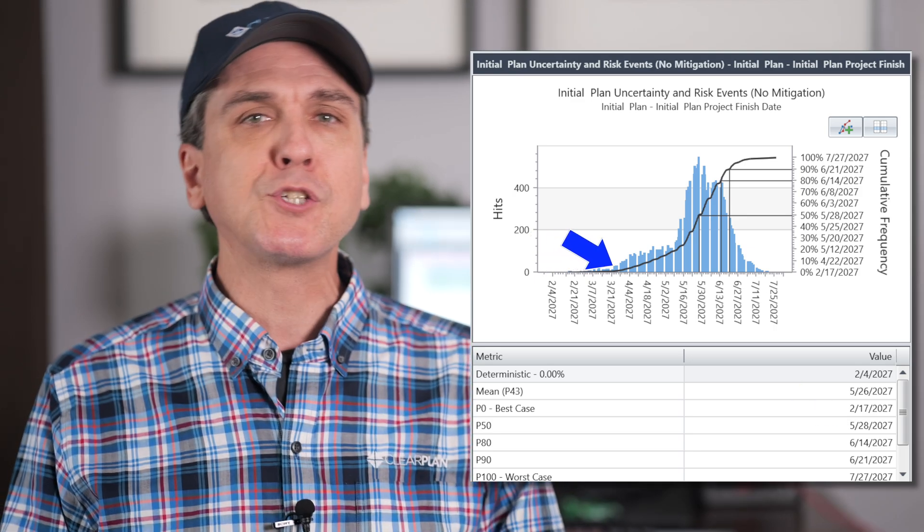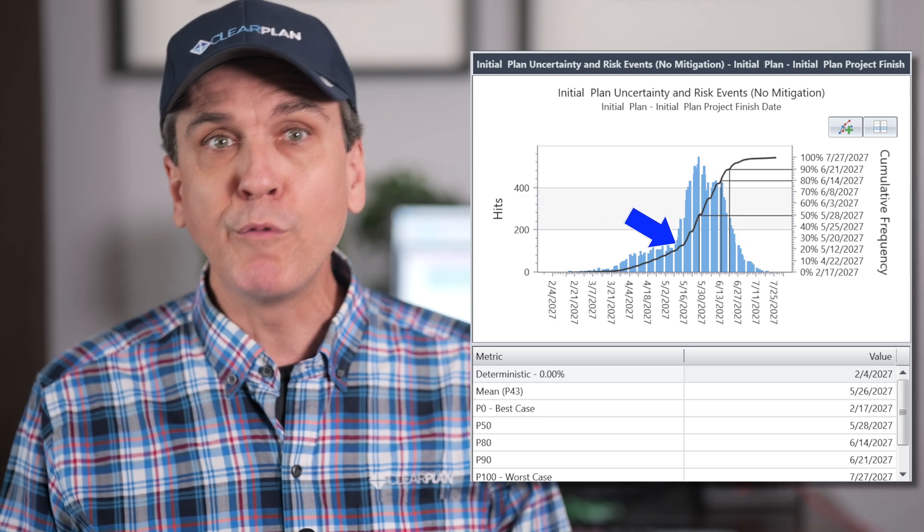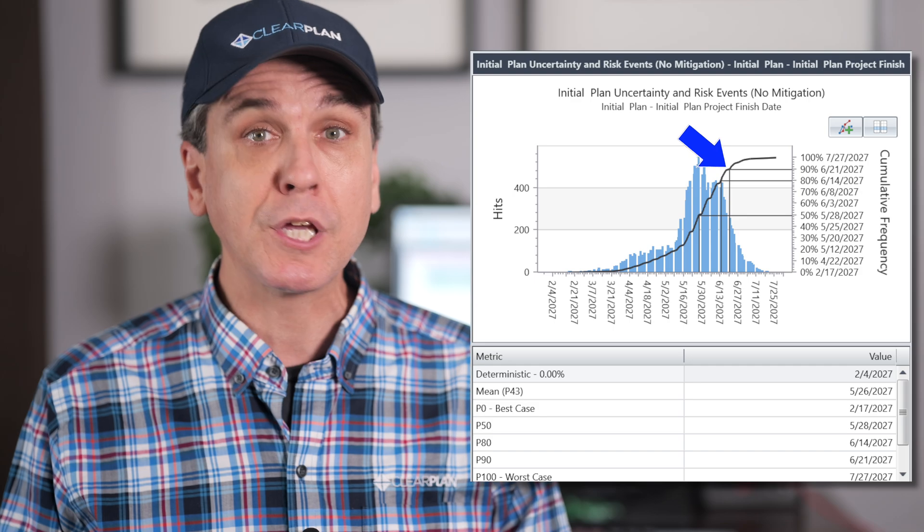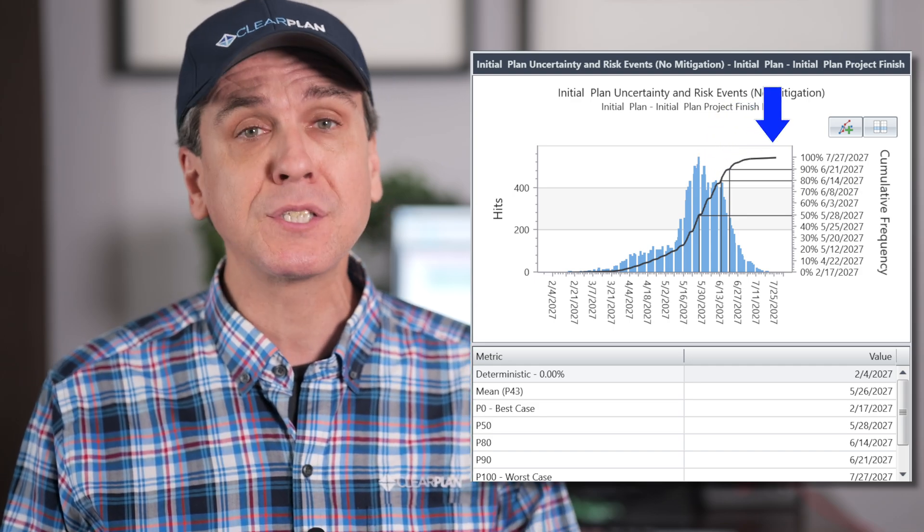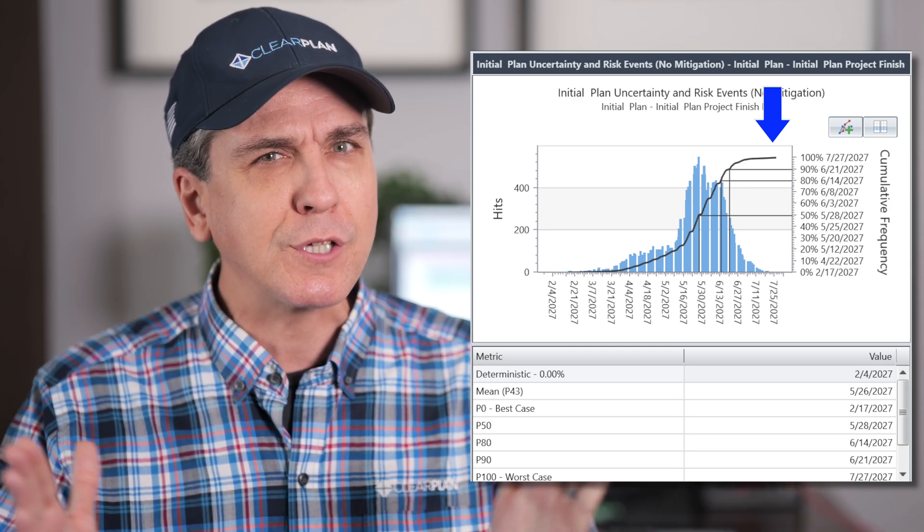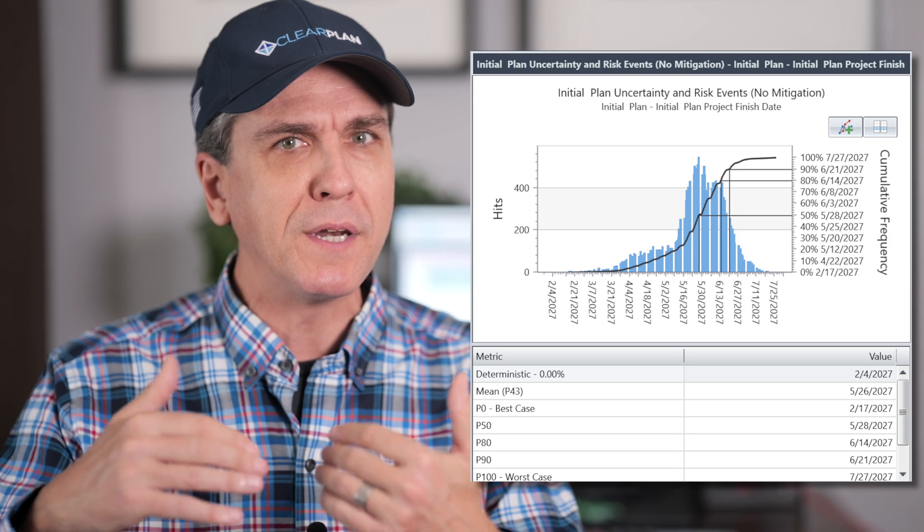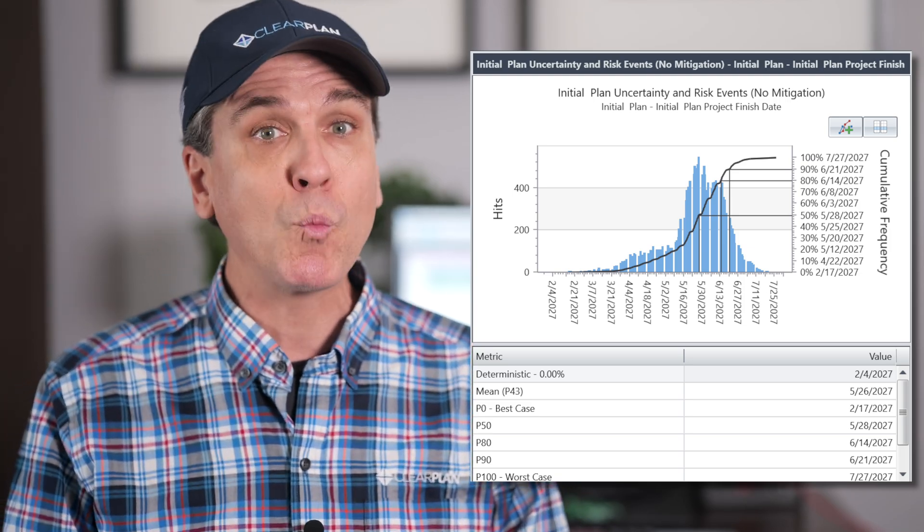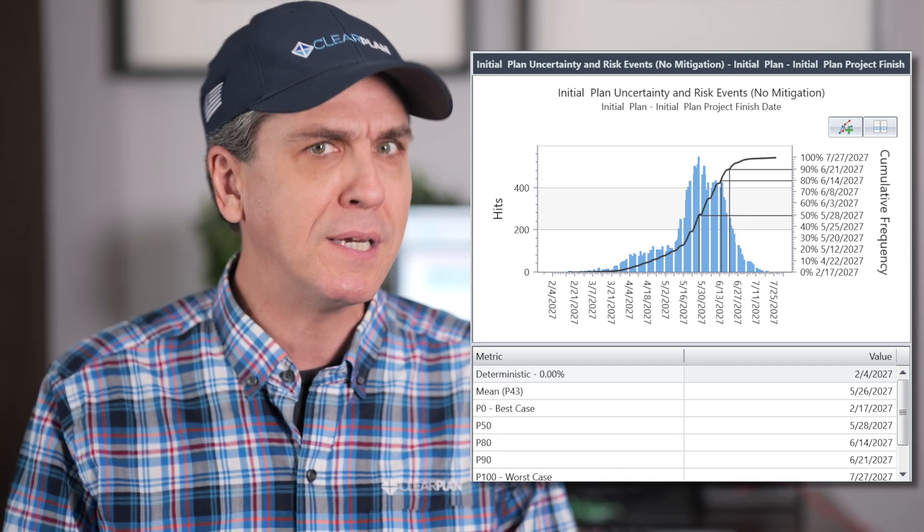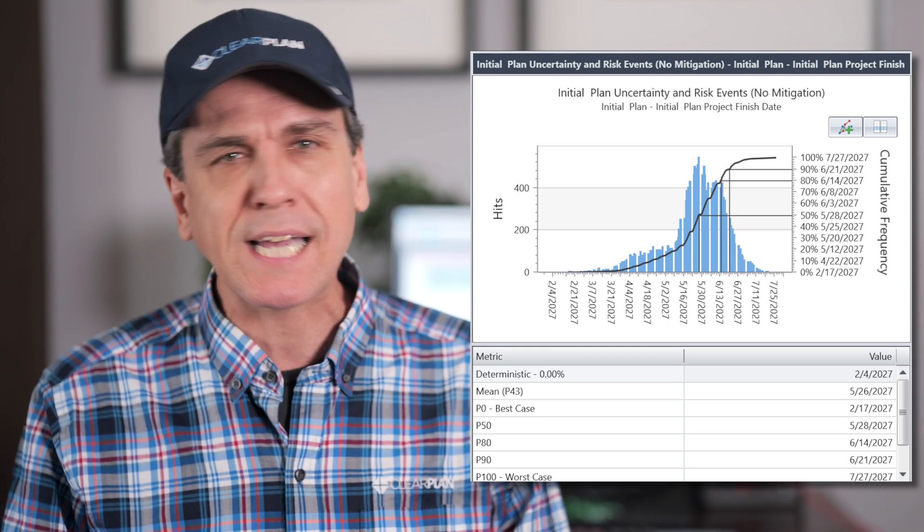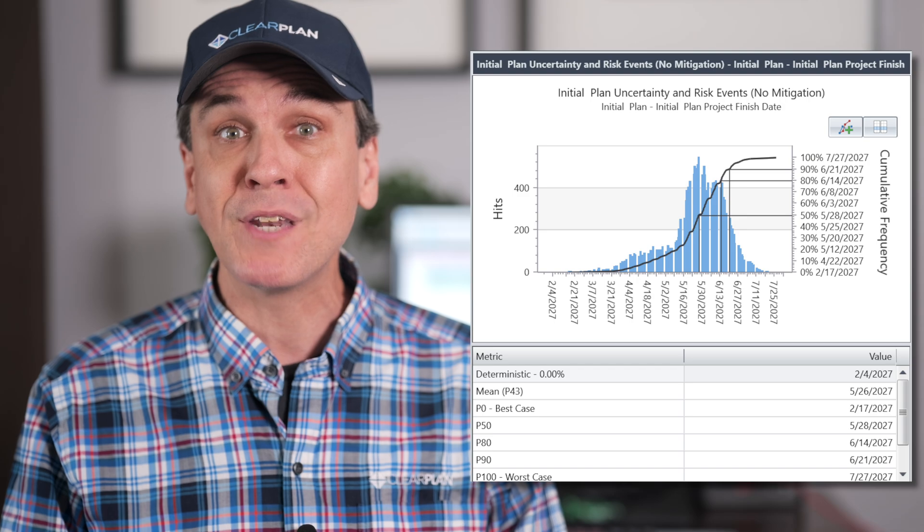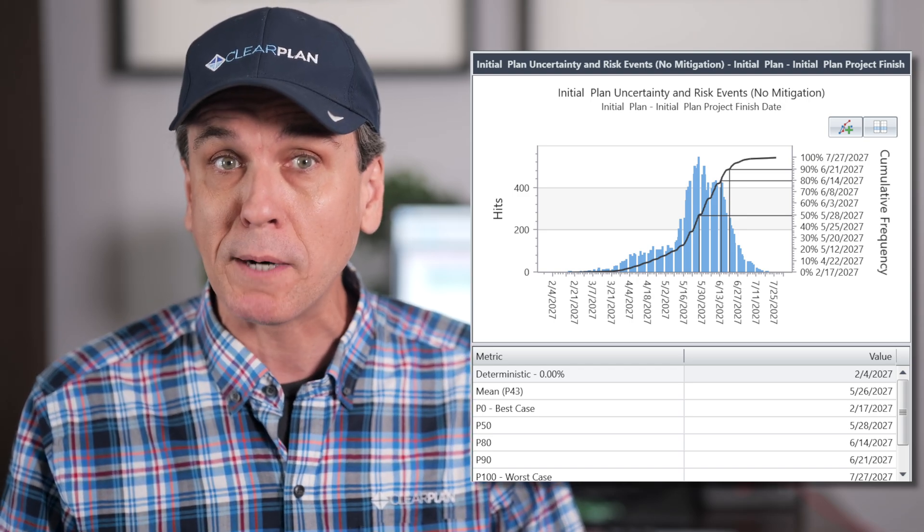The chart also has a cumulative S curve. As you move from left to right, each bar's hits are added to the cumulative curve. If there's long tail risk on the project, this S curve will be flatter. If the outcomes converge closely to one single date, the S will be narrow and tall. These visual indicators combined with the confidence level results like P50, P80, P90, P100 will help you assess the variability in execution with respect to finish dates for the project or any key milestone in the project as well.